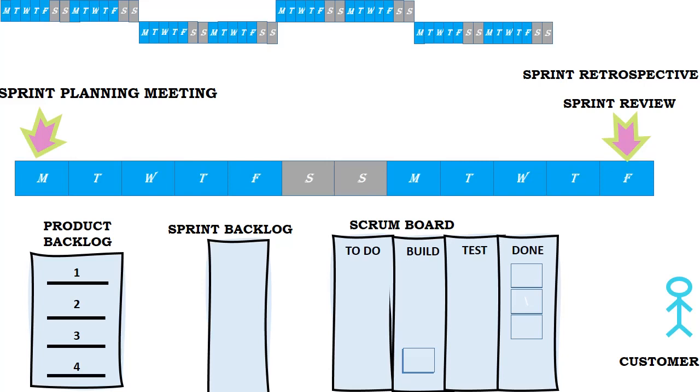When teams deliver small increments, they are more able to understand the true customer requirements faster and more accurately than with a static written specification. Teams can plan and manage projects with clear and stable requirements and clear technical challenges with little difficulty. However, as the uncertainty in the project increases, the likelihood of changes, wasted work, and rework also increases, which is costly and time-consuming. Many teams discover that when they explore the requirements iteratively and deliver more often incrementally, the teams adapt to changes more easily.